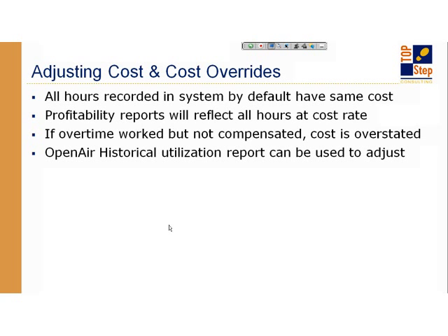That is a good approach when you're dealing with KPIs, especially if you want to refine estimates. We keep underestimating the testing window. We really need to make sure we get better at that, and so therefore we're going to increase that section in estimating so we don't kill our people and we're working lots of overtime to try and get stuff done. Okay, so there's a valid KPI there. I don't want people to think, oh well, it's all free hours. It still impacts your estimate.